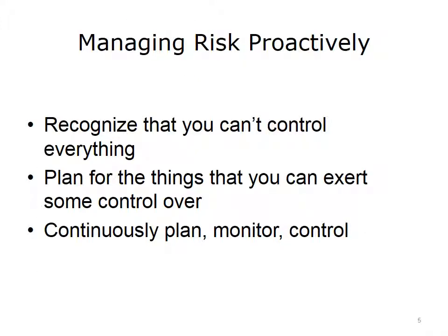You can't control everything, and every project has its curveballs, small and large. Proactive risk management is key to a successful health IT project. It's something you plan before the project begins, but it's also something that you monitor and control during the project. New risks will arise during the project that you will need to plan for, so these two activities, planning risk and monitoring risk, will coexist throughout the life of your project.